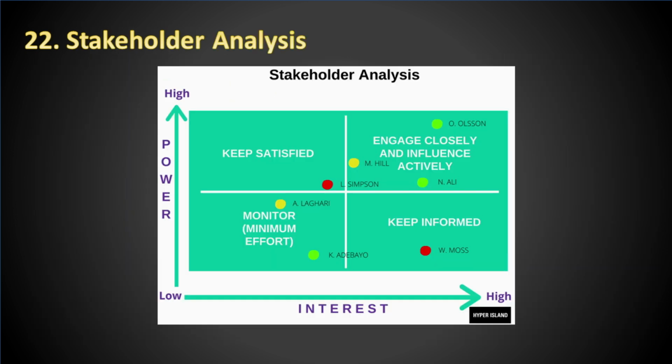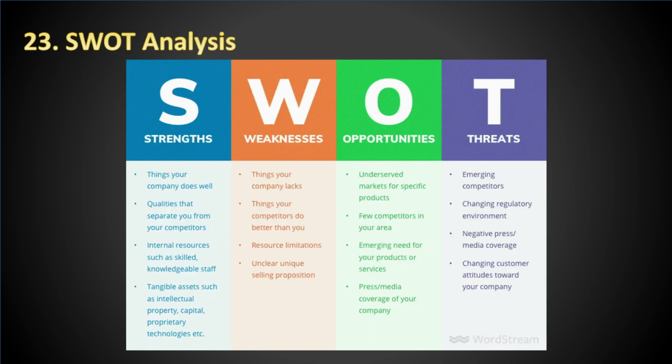Stakeholder analysis. A stakeholder analysis is a process of identifying these people before the project begins, grouping them according to their levels of participation, interest, and influence in the project, and determining how best to involve and communicate with each of these stakeholder groups throughout.